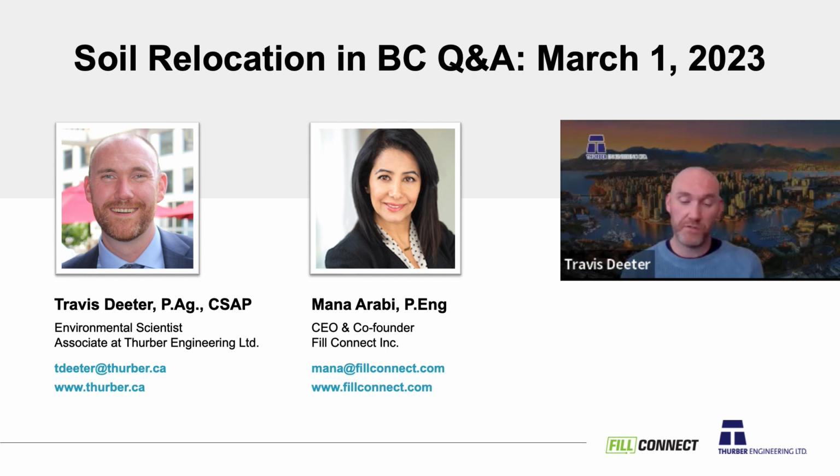So in this case, the first answer is yes, Protocol 19 applies because you've got a Schedule 2 use on your site. The second question is all about the quality of that soil. So that goes back to what I was saying about high volume receiving sites. Now, hydrocarbons are actually the one type of parameter where there are several typical parameters that have differences between those high density standards and the commercial standards. So if your soil has been tested according to Protocol 19, and if you come out with some of those concentrations that fit that Goldilocks definition, then that is correct.